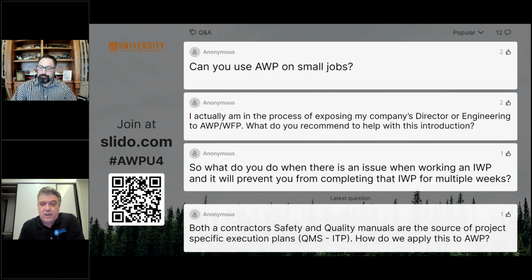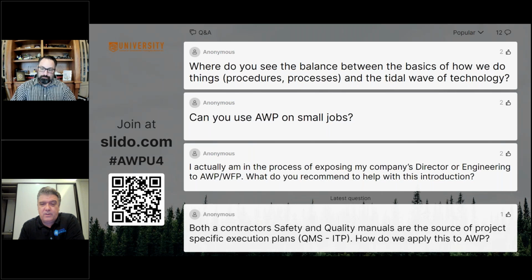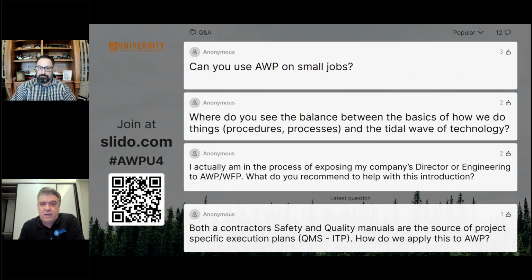But, you know, with the right approach and light weighting it, absolutely, you can do AWP on jobs less than $1 million. And then you apply it to a whole capital program, and it's not always about productivity at that point. In a running plant, it's often more about more efficient use of capital, making sure I can get the work done I want to get done through that year. Many times the productivity numbers are padded because the teams don't want to be browbeat on productivity, so the owner's not getting enough done for what they want to get done that year. So it's not necessarily meeting productivity numbers as much as it is more efficiently using the capital when windows of opportunities exist to execute the work.